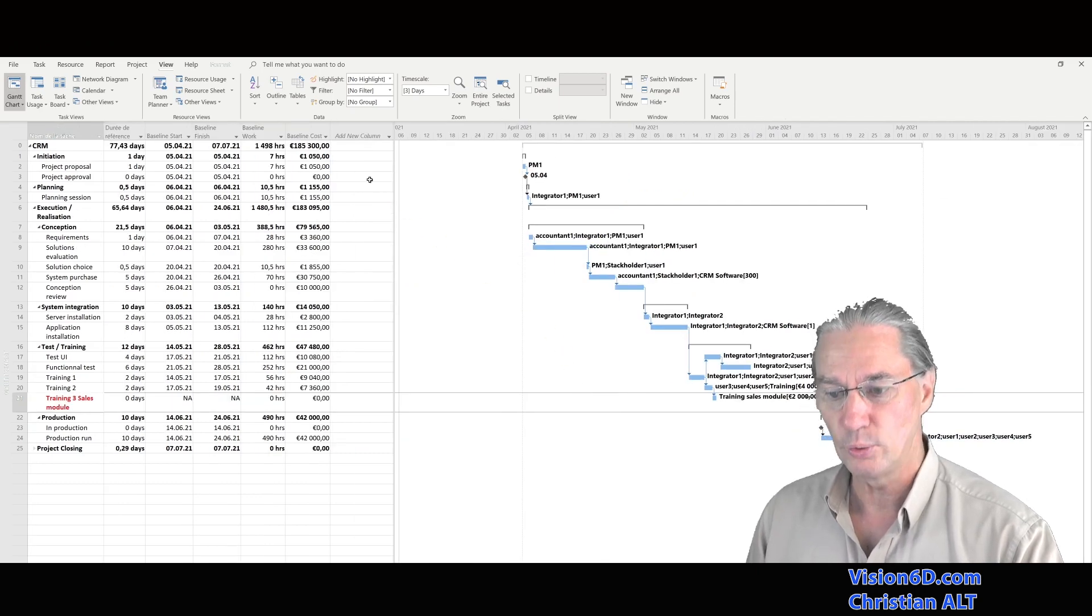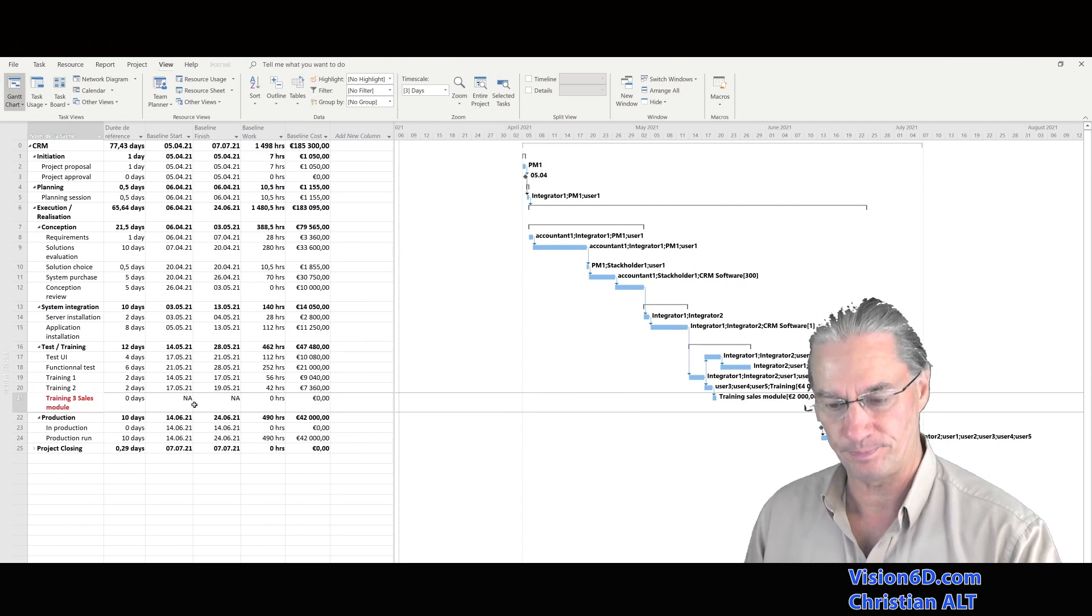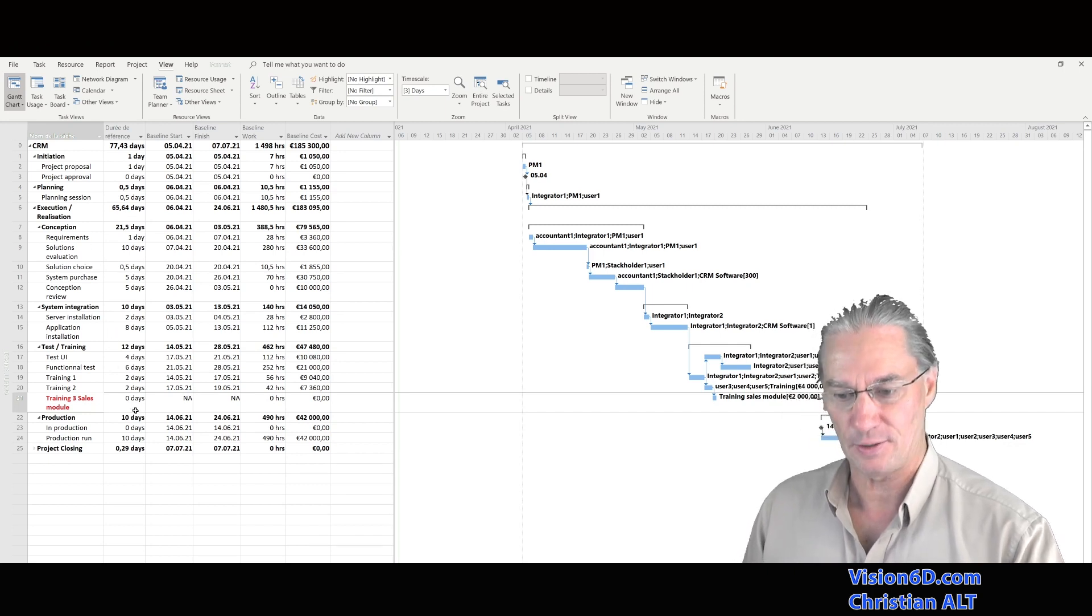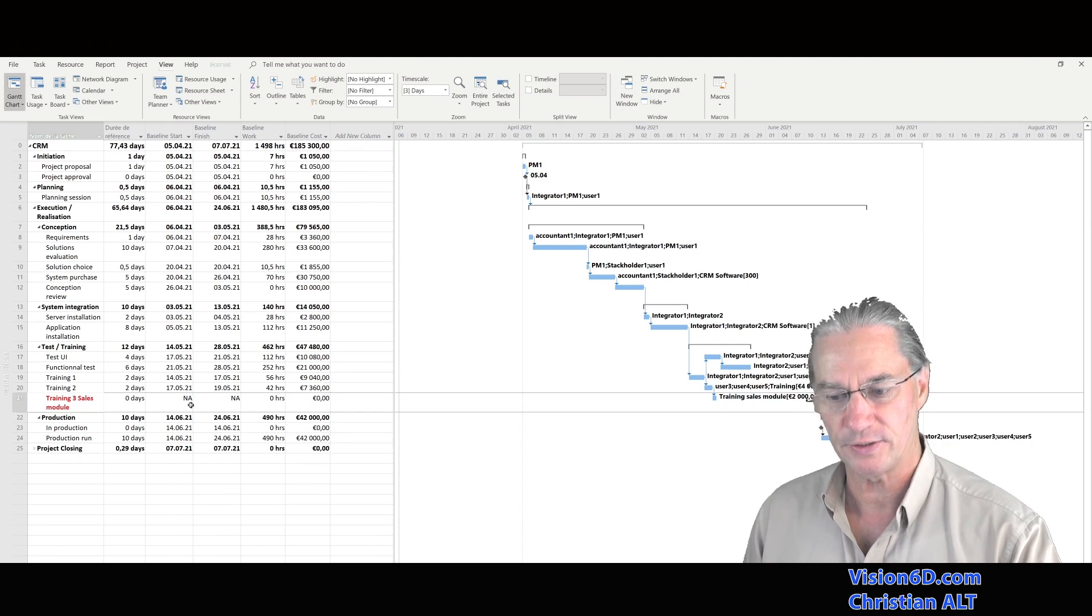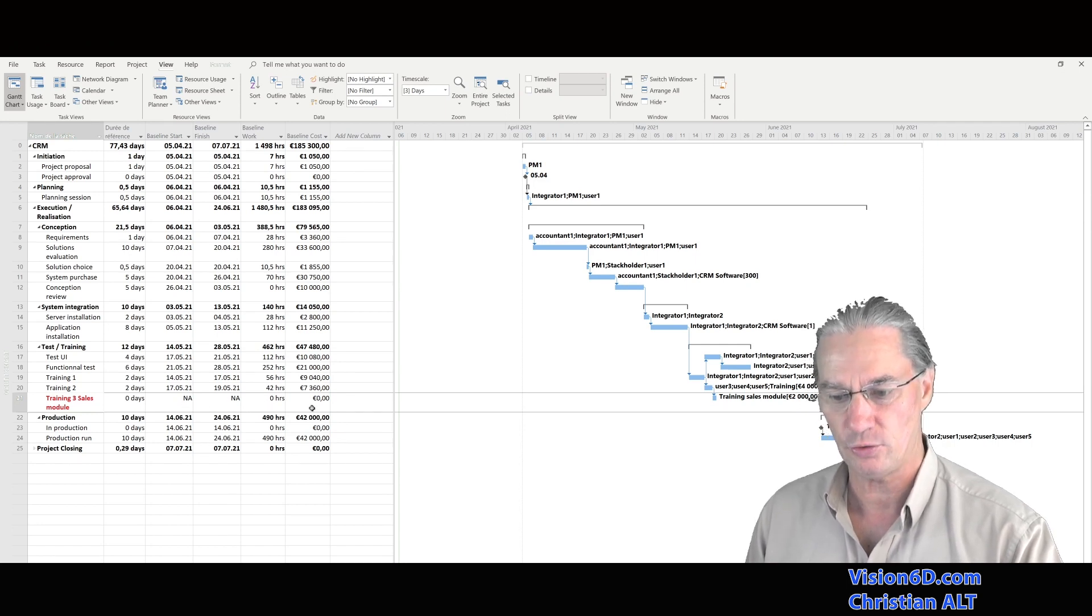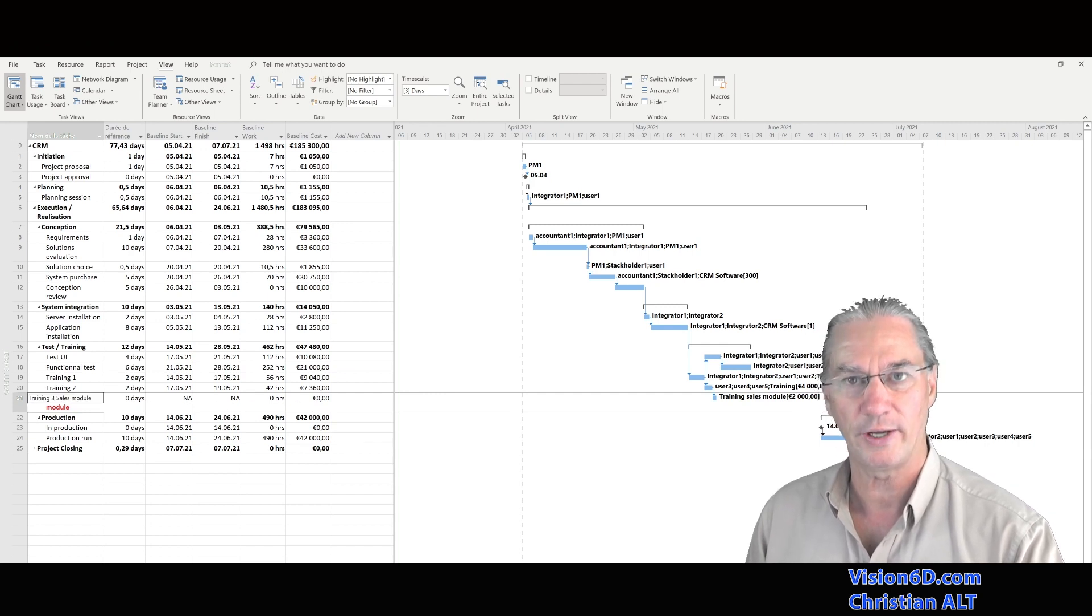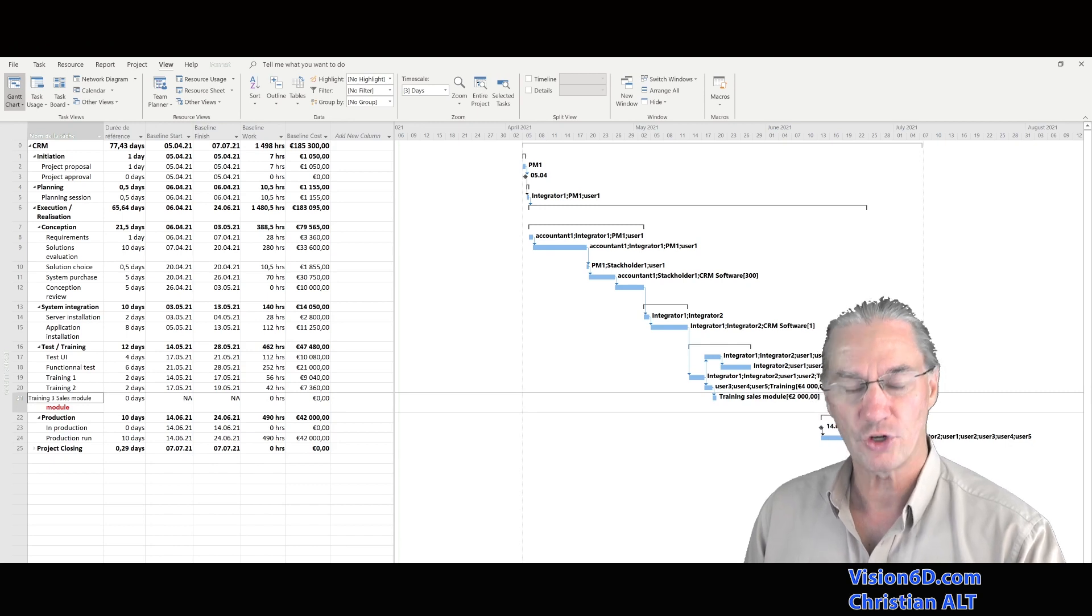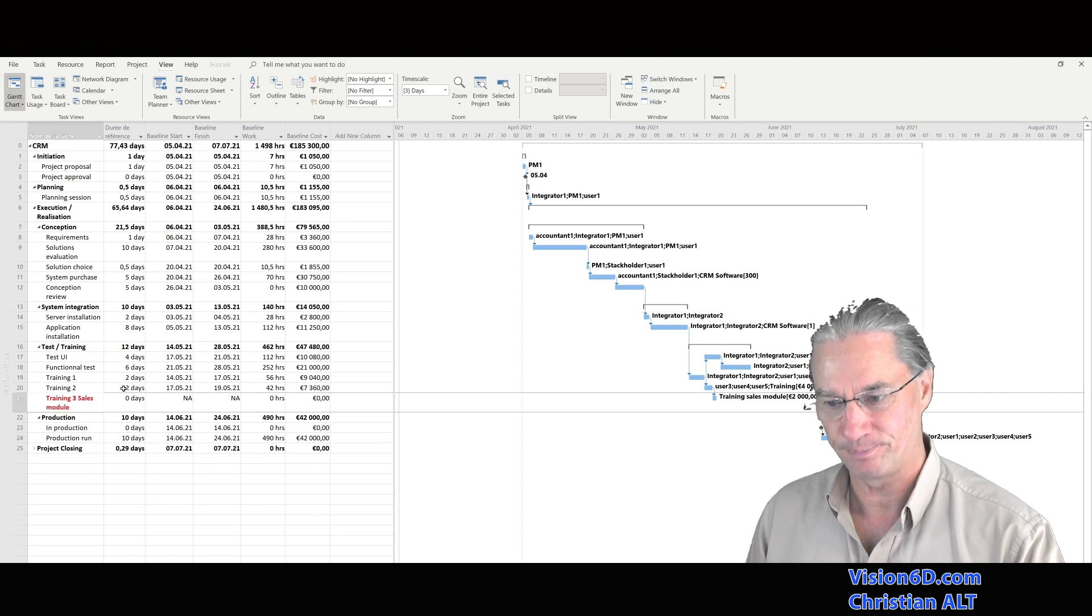And you will notice that we have on all tasks entries for the tasks in this project. And here down, I don't have any information. It's written as not applicable in that situation, which means that this task is not integrated in the baseline table. So our change, we want it to be integrated in there.